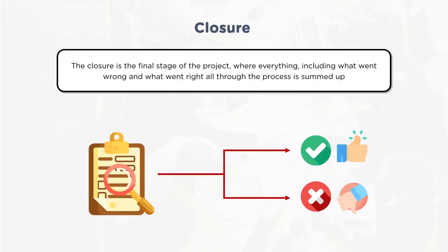During the closure, one has to ensure capturing all the details in terms of what is accomplished against what is defined, what went wrong, what went well, and what learning one has to take to the next level, or to the next phase, or to the next project. At the same time, a sign off has to be obtained formally, and everything should be summarized, with a good handshake with the project stakeholder, mainly the business or customer.